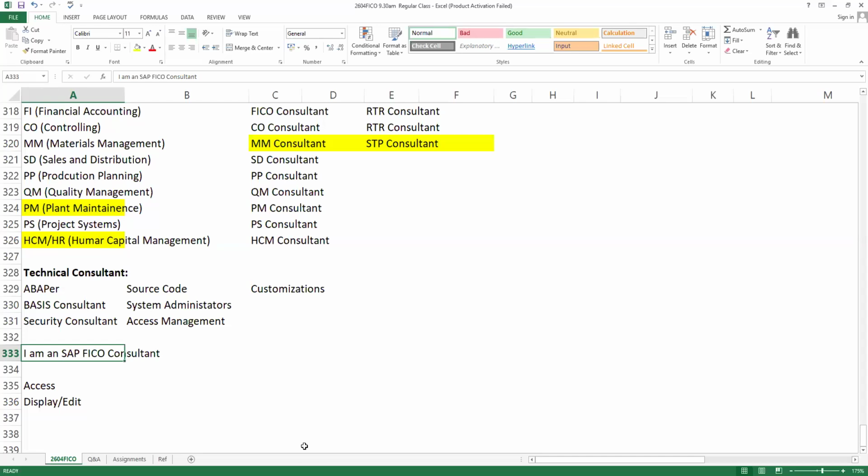Configuration can be done within half an hour. Baseline configuration will be completed in SAP and we can post the first transaction. But in real time, do you know how much time it will take? Even a small project will take somewhere around 6 months to 9 months. Why? Because those are very much restricted environments. The system landscape will be there. These things no trainer will tell you. It's a very restricted environment. You need to chase these guys. It's not that easy to get access.